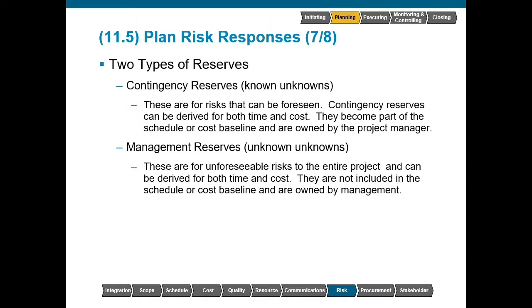They will be part of the schedule or cost baseline and are owned by the project manager who has the authority to apply them as necessary. Management reserves are for unknown unknowns. These are unidentified risk. These are not on the risk register. These are for unforeseeable risks to the entire project. When we say unforeseeable, it would not be reasonable to assume that the project manager should have identified and included these risk events on the risk register.